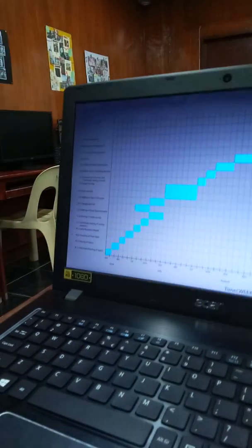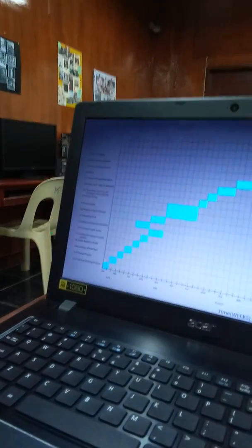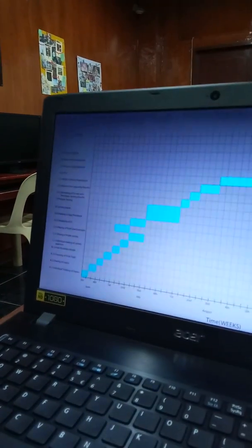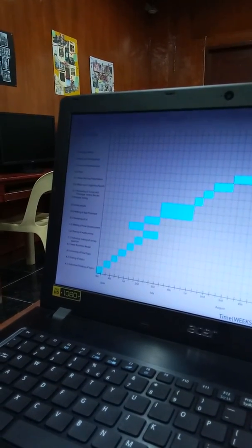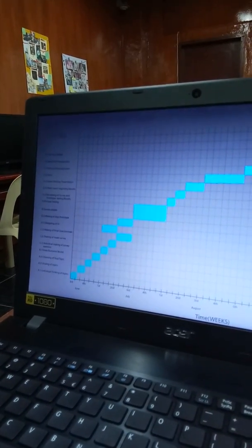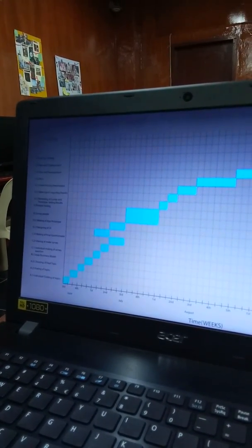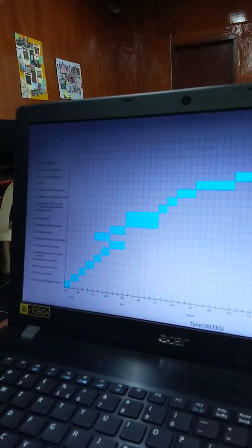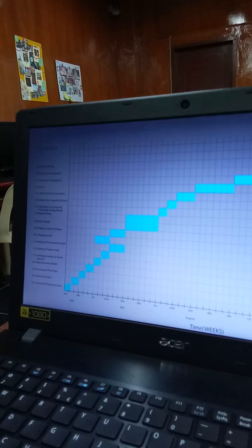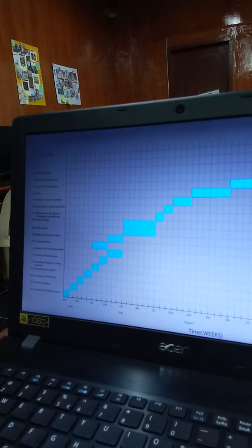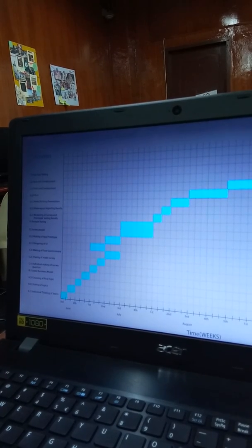So in the first activity, that has no predecessors, the activities A.1 to C.2, the order of having predecessors are incremental. But on activity D.1, its predecessor is activity B. So as soon as activity B is finished, the activity D.1 begins.